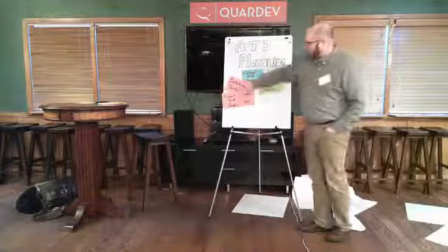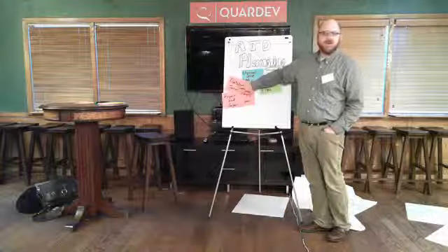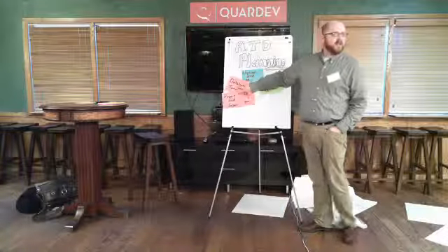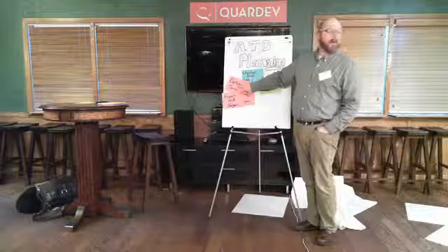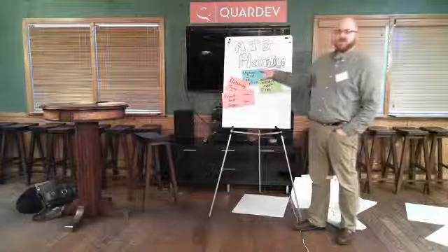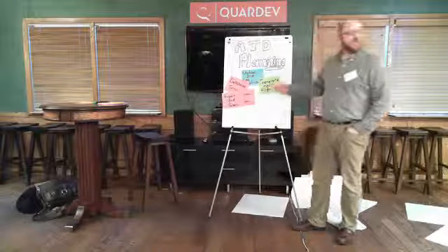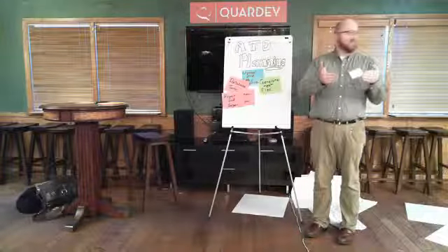And I can tell, even if I'm not deeply technical enough to understand what these tasks are, I know that these three things have to get done before this can be tested, and y'all aren't working on them, and I want to know why. That's something I can understand. We made this plan to unlock this one first. You're working on something else. Should I change to go along with you so that we understand we're all working together towards the same goal?